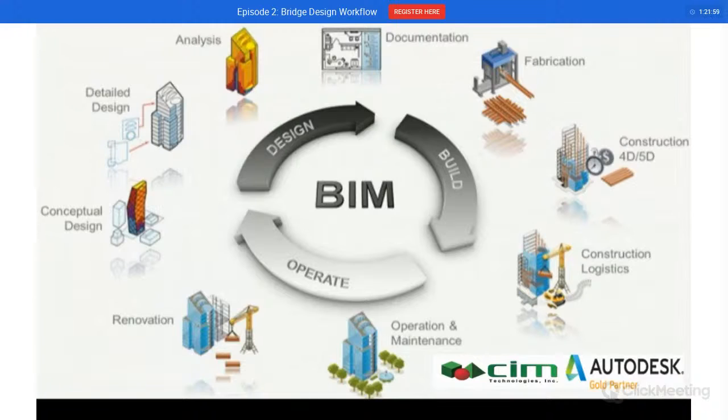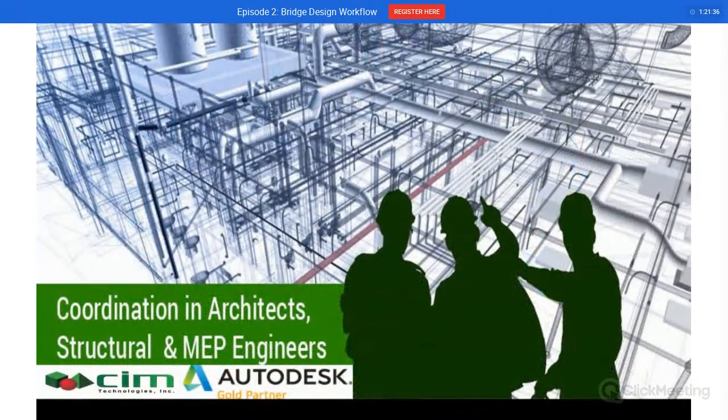So we are talking about the design phase right now. The overall design phase consists of several stages. That includes the conceptualization, conducting feasibility studies. It also includes the detailed design, the production planning, and the construction detailing. And during the design phase, this is not only limited to our architects because it includes the coordination of our architects, our engineers, especially the structural and the MEP.